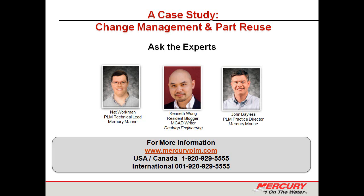So it really sounds, from what you gentlemen have explained, that a big dependency here is on how much money is actually involved. Well, what happens is, depending on the volume of parts affected by the change, for example, if it's a part that's used on 5 products, and you have, let's say, a volume of 10,000 of them, that would be a different effect to the organization than if you're making a change to a part that's used on 100 pieces, for example, on a lower volume product. So that's one of the reasons we look at the cost impact and the volume, because they're tied hand in hand.